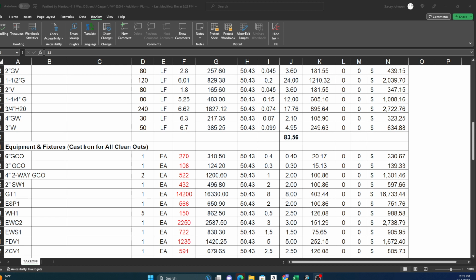And in this video, I'm going to go over quickly the thought concept behind how you as a plumbing construction manager or a plumbing professional can think about building a construction schedule based on your estimate. So if you have a detailed estimate like the ones we produce, it's pretty easy. Because a construction schedule just means that you are trying to outline the amount of time it's going to take you to do the job. And some jobs you can do together, some have to be done first before others.